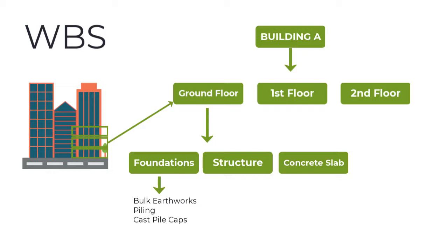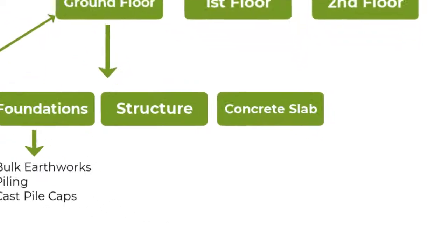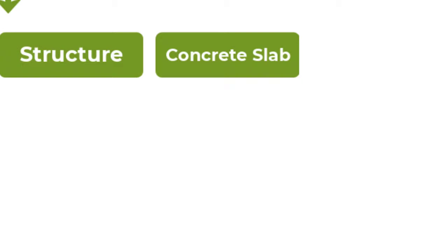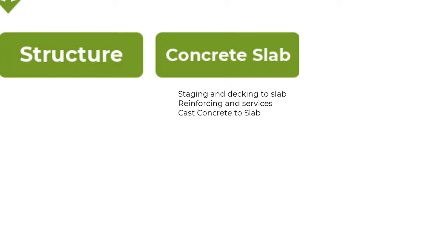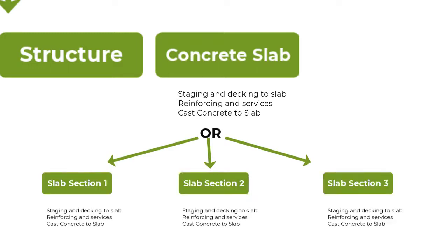Secondly, a work breakdown structure facilitates a level of detail that we want to see in our schedule, which will support our execution and the monitoring and controlling of our project. In this example that I've got here, if you look at the concrete slab for instance, we can simply add tasks below this work breakdown structure component directly, or we can decide to break it down into smaller bits, which will increase our level of detail. Let's explore this level of detail concept a bit further.